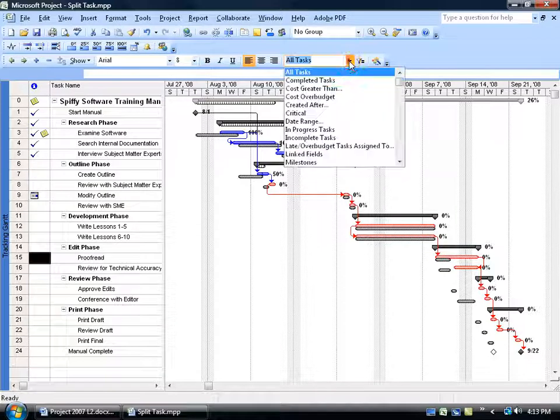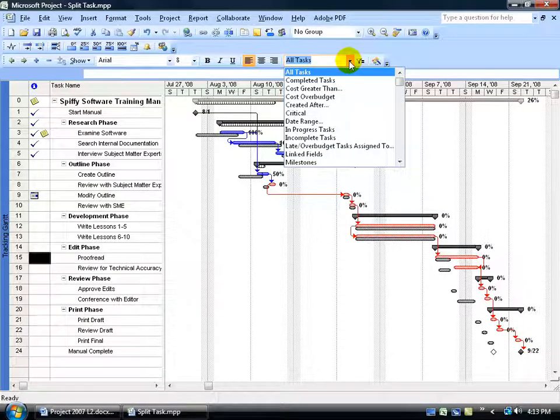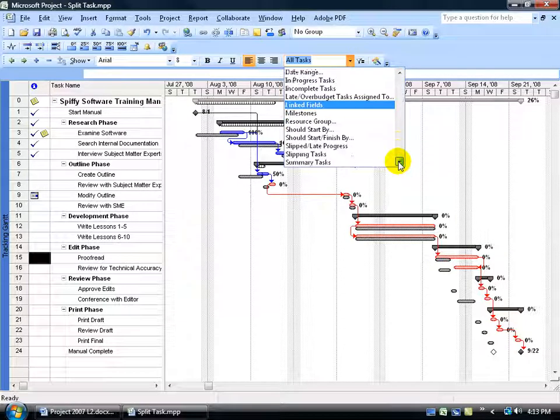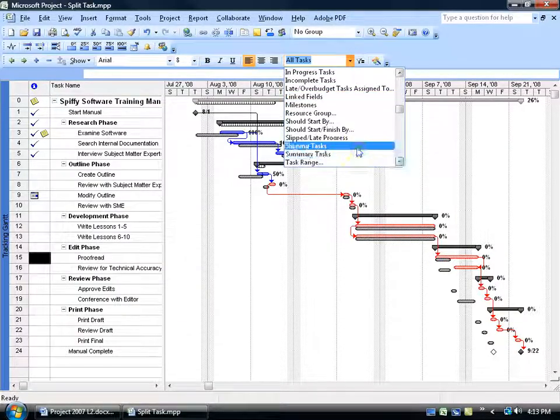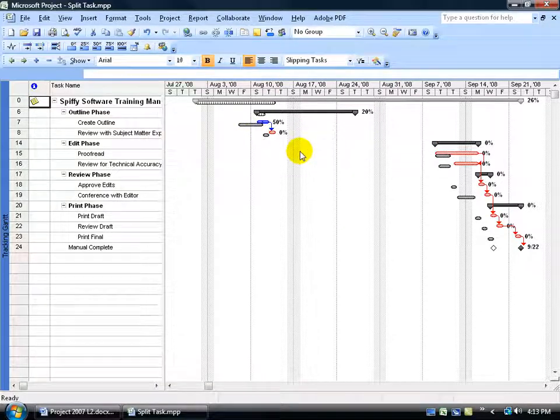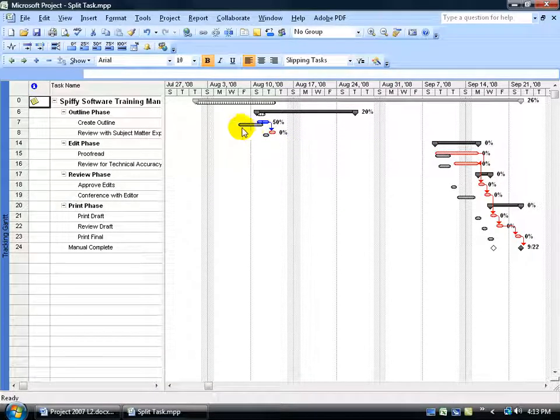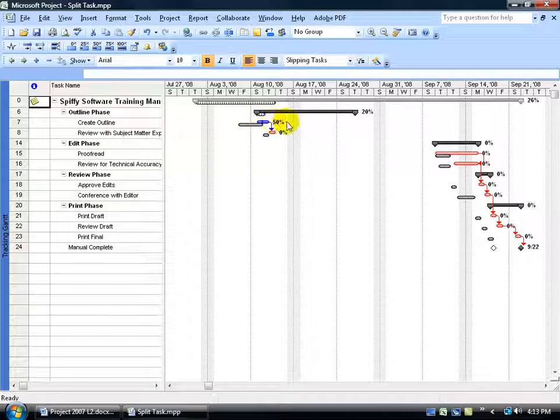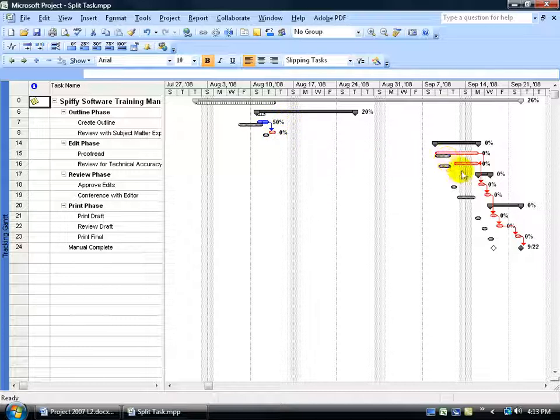Or you can come up here, click on the drop-down arrow. Again, come down here to Slipping Tasks. Wow, and you can really tell here, when you go to Slipping Tasks, how far they slipped from the baseline. I mean, this is the baseline, all the black bars here. And the non-critical task, the only one here, that slipped out quite a bit. And then all the criticals, you can see, they slipped out quite a bit here.